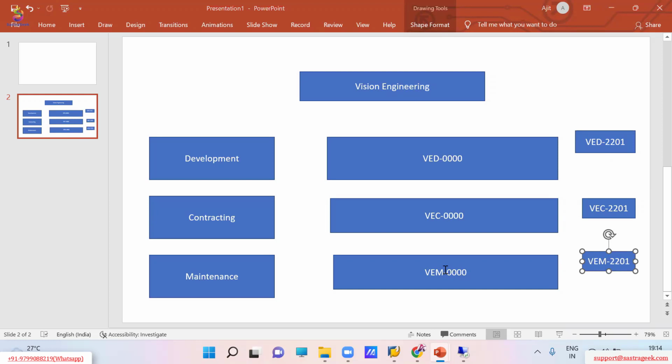May I know if anyone has any questions? Are you clear? We are going to map this business requirement. What does the business always expect? Company name, type of project, company code, then region, state, location. In that case, we have to add one special character in the project definition, and we can add state as well if they want. M stands for Maharashtra, K stands for Karnataka, U stands for Uttar Pradesh. So we can also add state and location as per the business scenario.